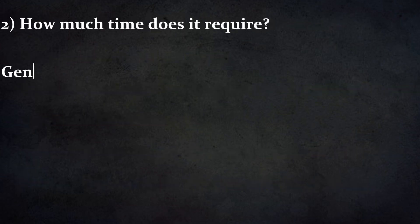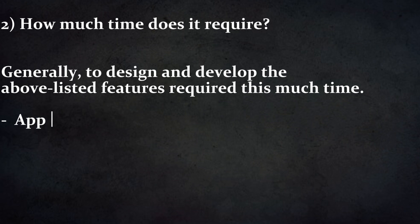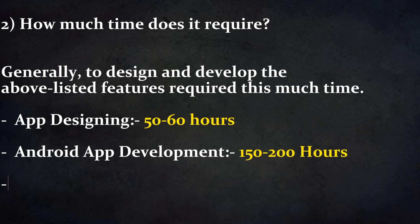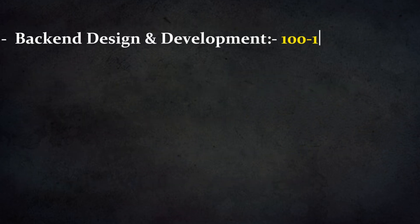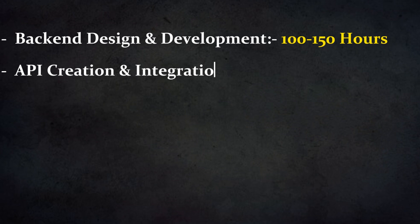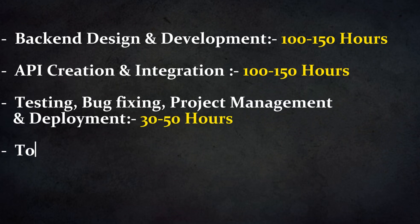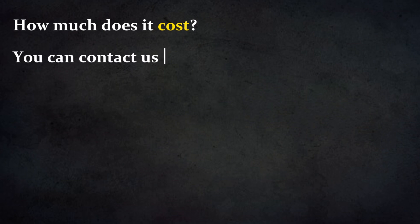How much time does it require? App designing: 50 to 60 hours. Android app development: 150 to 200 hours. iOS app development: 150 to 200 hours. Backend design and development: 100 to 150 hours. API creation and integration: 100 to 150 hours. Testing, bug fixing, project management, and deployment: 30 to 50 hours. Total: 580 to 810 hours.